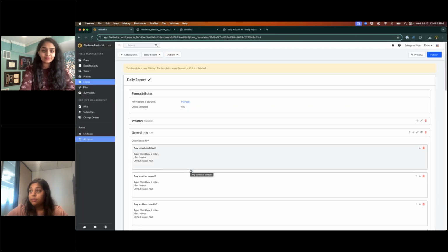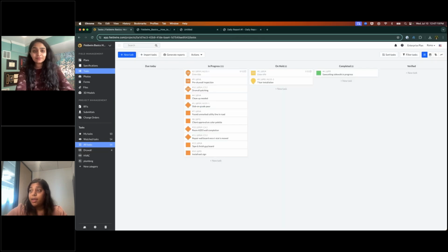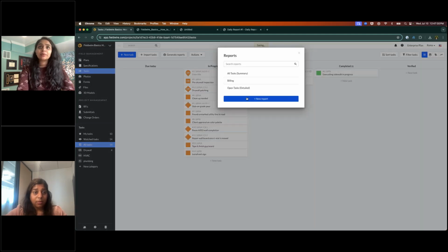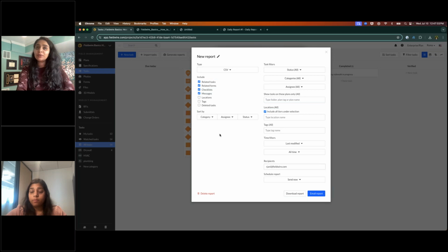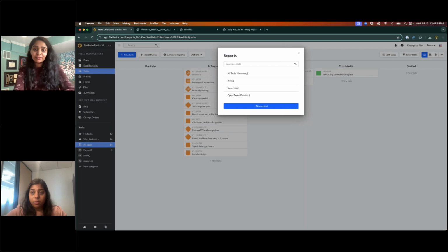Awesome. We had a great question from the tasks section. I'm just going to go back to that. Can you export a CSV from tasks to be imported to a different project? Yes, and we see that all the time. So as I can see with my report, if I come here, we have a CSV, you can include everything. And then you just have to make sure that you have it formatted to match the importer. So what that means is setting up your CTAs the same as the other project, or using the same template, cloning, etc. But yes, the short answer is yes.